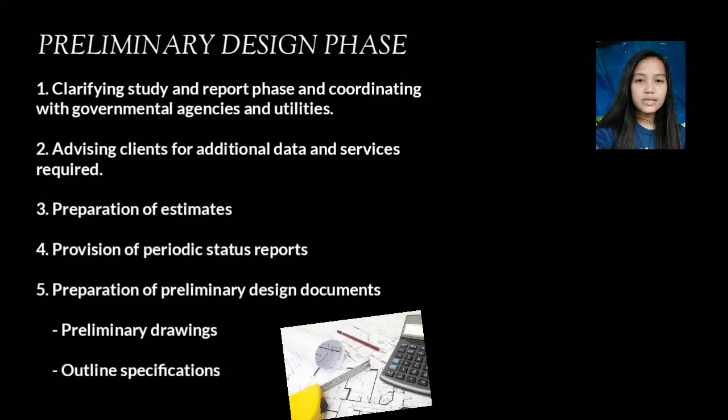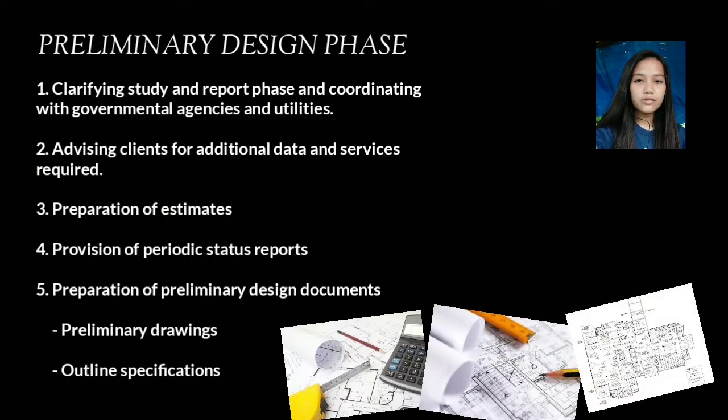Next phase is the preliminary design phase. Preliminary design includes establishment of general size, scope, and location of the project. The services include clarifying study and report phase and coordinating with governmental agencies and utilities, advising clients for additional data and services required, preparation of estimates, revision of periodic status reports, preparation of preliminary design documents such as preliminary drawings